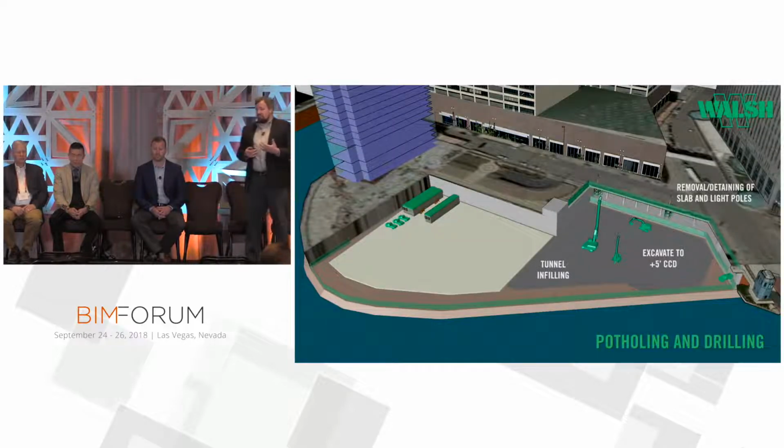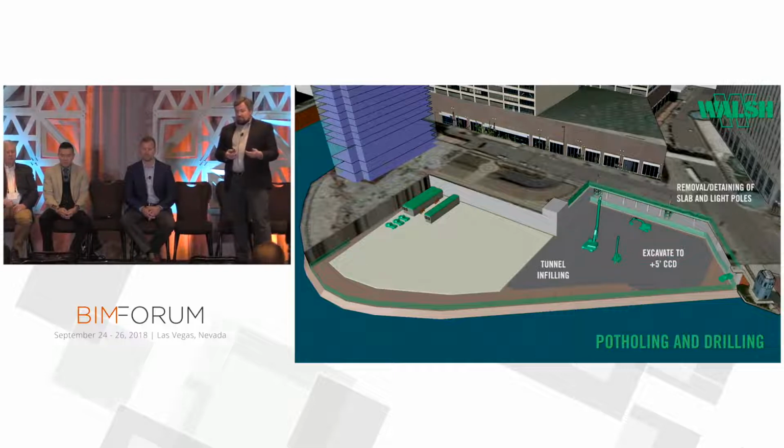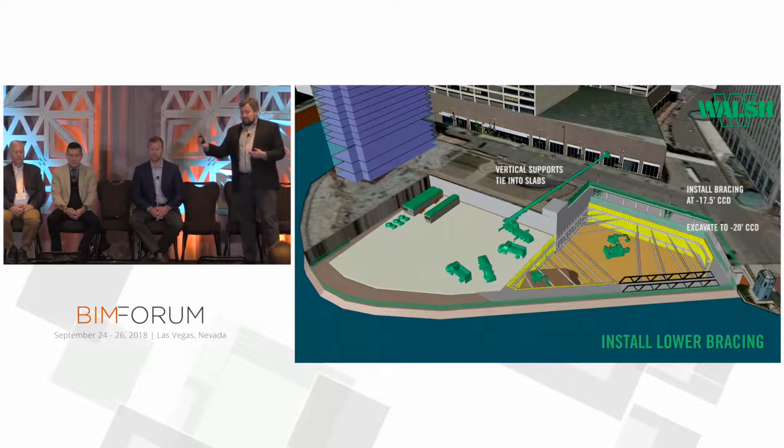The first problem we were trying to overcome was that the job site, the gray area you see on the right, is cut off from the laydown area in beige on the left as soon as you start excavating. Our civil group was laying out the earth retention system, which is not a small feat of engineering because you're excavating 75 feet immediately adjacent to the full weight of the Chicago River. But because they use bridges to build other bridges all the time, they said, don't worry about it, guys. We'll just bridge the excavation with this trestle bridge. We've got one in the yard right now. We can float it on a barge on the Chicago River and get it to you at the end of the week if you need it. So they stepped up there.